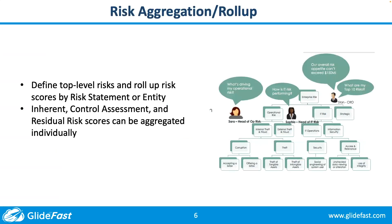Another feature is risk aggregation and roll-up. We can define top-level risks and roll up the risk scores for child risks up to those top-level risks. Typically, you'll define risk statement or entity hierarchies to establish parent-child relationships for risks, and you can roll up inherent, control assessment, and residual risk scores individually onto those parent-level risks.